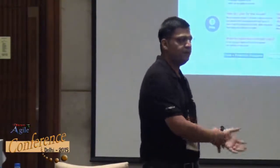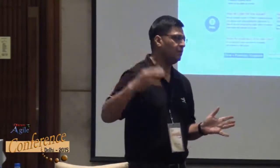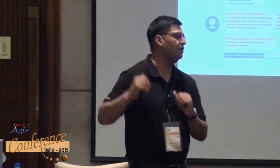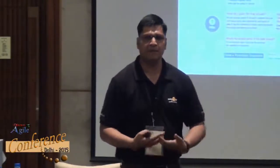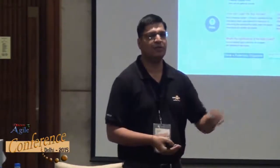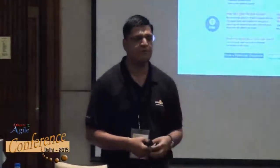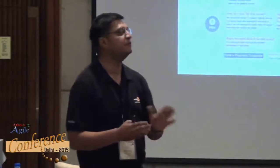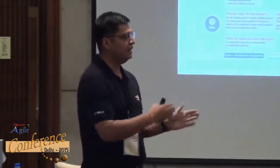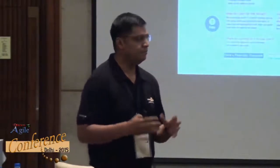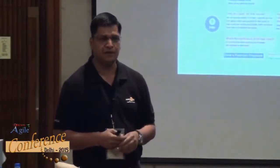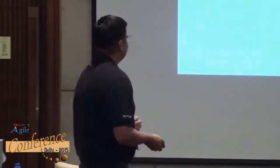Interestingly, those two dedicated people could do the work that the scattered 20% effort across 20 people could not. That is something agile does not prescribe, but it was our situation and how we addressed it. We still have improvement areas, but it helped a lot. At least the 16–17 other people can focus on their planned sprint work.